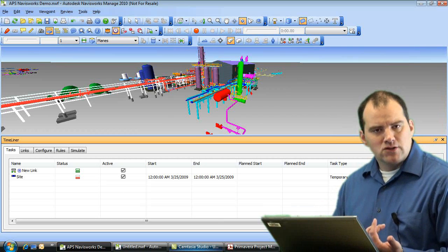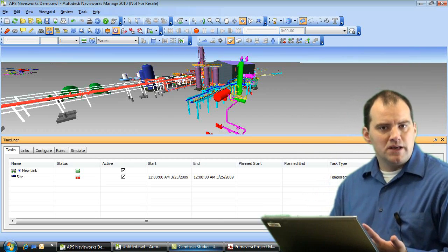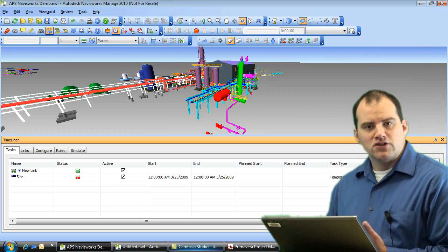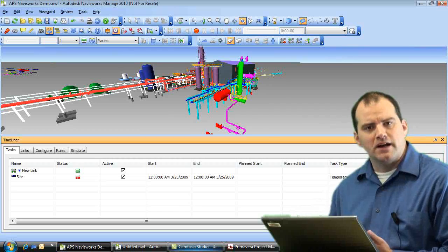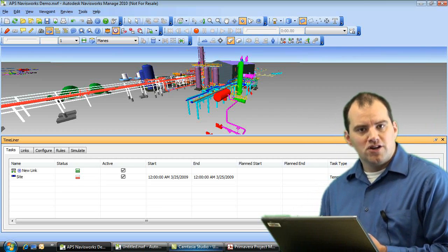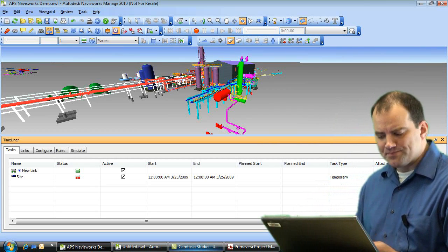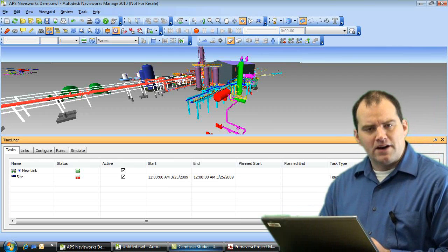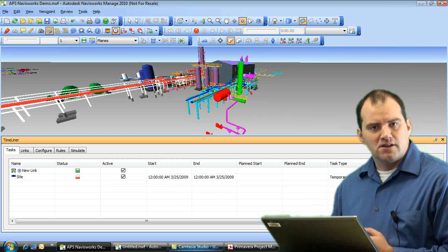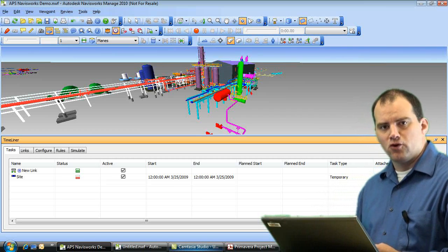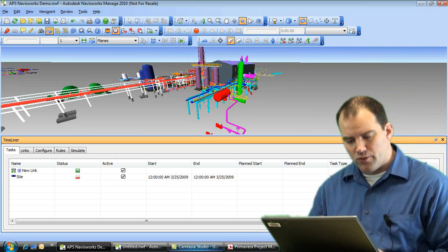And right now, Navisworks will bring in not only the Primavera P3s, but the P6s, but also Microsoft Project or CSV files. If you're working with SureTrack or some of the other scheduling applications, you can bring in the MPX file format as well. And also for our counterparts over in the EU who may be using Asta Power Project, that is another recognized format that Navisworks will be able to work with.